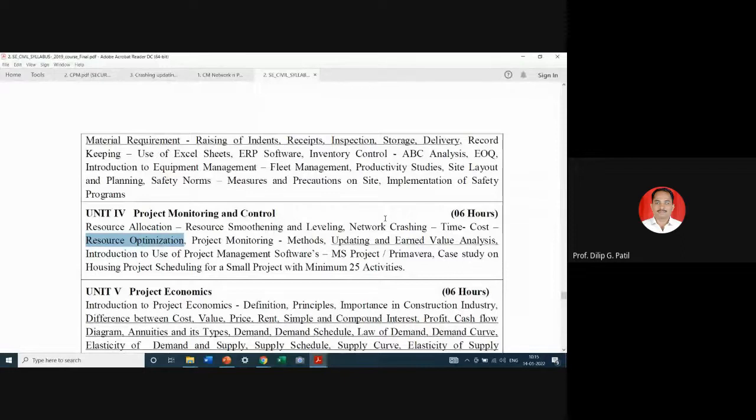Construction site वरती ज्या काही activities चालू असतील, as per our planning and as per the execution status, they continuously update the project network, and accordingly they guide other teams for further necessary actions. And accordingly, the activities which are to be planned in days ahead are properly scheduled, or their durations, their manpower requirement, resource requirement is properly seen, and accordingly their execution is planned. So project monitoring methods, and under that updating is also one of the important tasks.